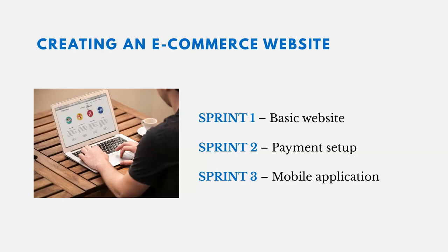So the first sprint or increment is to build a basic website, and then after that, a couple weeks later, we set up payment, and then a couple weeks after that, we build the mobile application, have that ready to go. So we're delivering this thing in small pieces and just building it up, adding to it over time. Again, that builds momentum, morale, excitement. It keeps things going and allows you to make some adjustments, because maybe if you wait until the end of the project to deliver everything, maybe things have changed so much that it's not really helpful or needed.